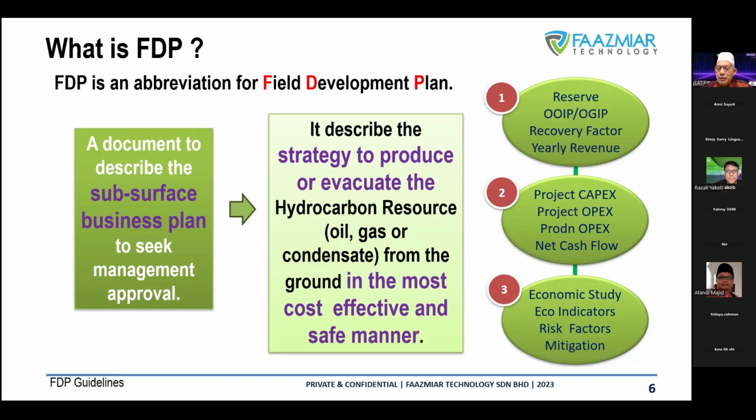P50 is more or less an average, something in the middle, where you can have more profit or lower profit. But P80 is what we call very difficult. You are expecting some failures, some problems, some misjudgment. So the P80 numbers will give you a cost for the project.